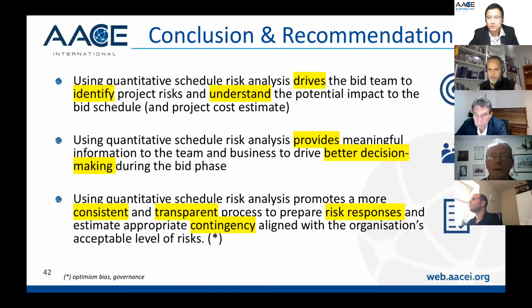One of the questions here from Louis is, did you have good interaction with your client in developing the risk register? Well, I guess it all depends on the bid process with the client. There are some clients that are okay to have an open conversation about some of the risks, and some clients say that any question has to be open and shared with all the bidders. So it's really your strategy, whether you want to share this with your competitors during the bid, or just make an allowance, or just qualify.